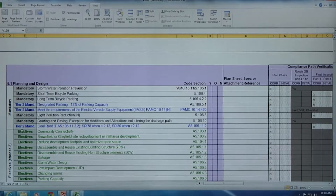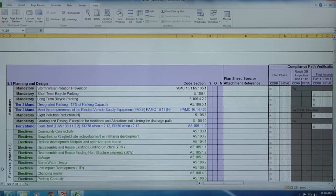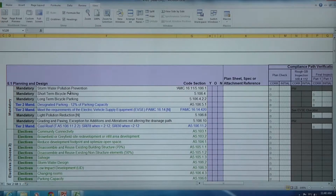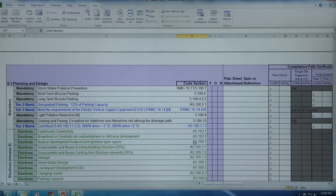The requirements listed on the left hand side identify mandatory requirements, Tier 2 mandatory prerequisites, and elective measures. The number of required elective measures are identified down below. The code provision title is listed in this column as well as the code section requirement and reference in the column just to the right.